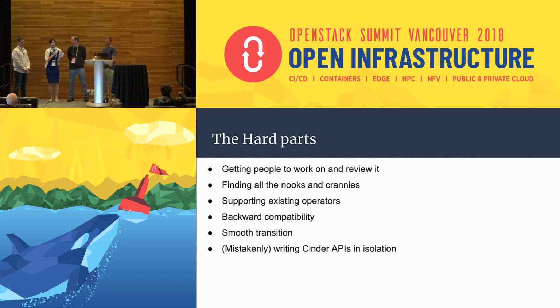All right, I will start. One of the hard parts of making this happen is getting people's attention from both affected teams. If you ever have to land a feature in the future where you need consensus from multiple project teams, then prioritize that from day 0 or day -1. Otherwise your life will be really miserable and painful, because they are all cats. They all like to go in the direction they prefer, and they have their own set of priorities.